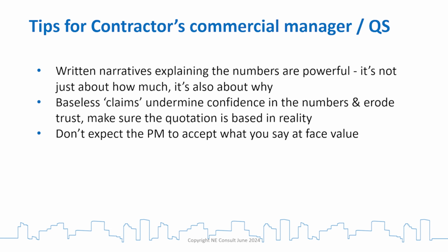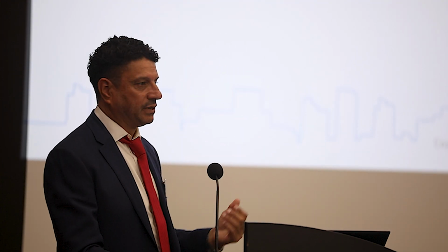If you're on the contractor's side, written narratives explaining numbers are powerful. It's not just numbers. What do they mean? What are they based on? Do not put in baseless claims, because that works against the trust and confidence: the spurious claims, the dreamt up things. Just be straight down the bat. If you're entitled to it, you should be paid it. You shouldn't need to dream things up. Base your quotation on the reality of what's happened, because if you don't, and somebody looks at it very closely, they will find out that you weren't telling the truth about what happened.